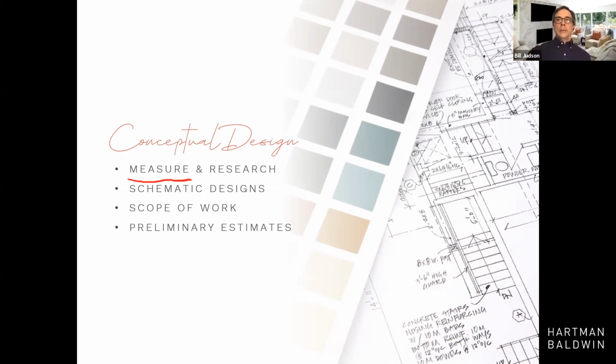We need to spend a little time doing some jurisdictional research. So we're going to go to your jurisdiction, whether that's the county or the city, and make sure we understand what the codes are, what the restrictions are, and what their parameters are for your property in particular. Then we're ready to start doing some designing, okay? And I'm going to show you some examples of that in a minute.